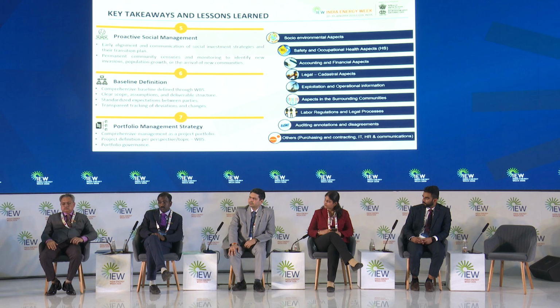Here is an example of the topics that we use: environmental, safety, financial status, legal commitments that you have, how you're going to deliver the information and the knowledge that you have built during this time, because you need to transfer it also to the new company. Labor, auditing, and other regulations, the purchase and contracting, the contracts that you have in the operation. So here it is important to have that.